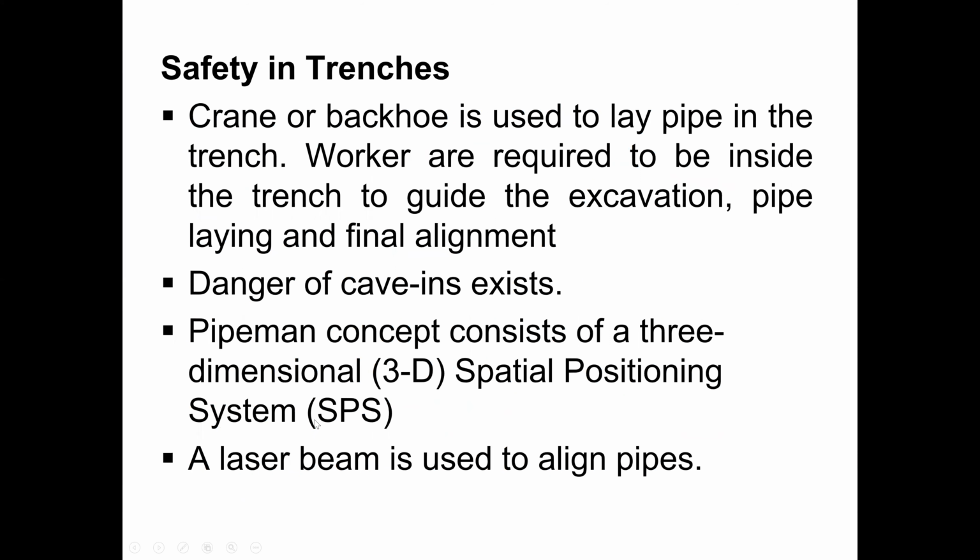Here we have discussed most of it, and now we are going to discuss safety in trenches. In excavations, a crane or backhoe is used to lay pipe in the trench. Workers are required to be inside the trench to guide the excavation, pipe laying, and final alignment. The danger of cave-in always exists. The pipeman concept consists of a three-dimensional special positioning system, where a laser beam is used to align a pipe.